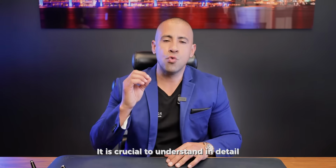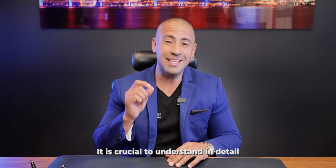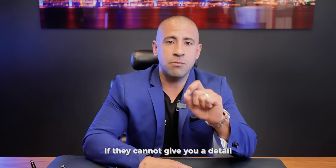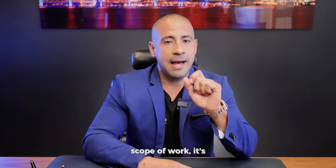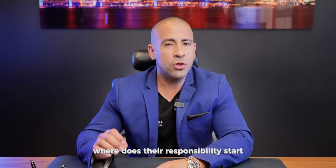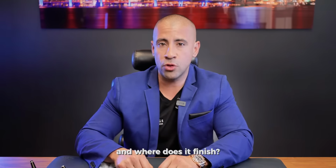Question number 4, will you provide a detailed estimate of the project scope of work? It is crucial to understand in detail what you're getting for what price. If they cannot give you a detailed scope of work, it's a bad idea to sign any contract. Basically, where does their responsibility start and where does it finish?